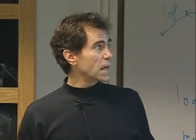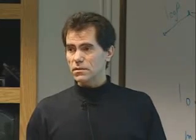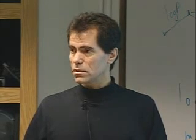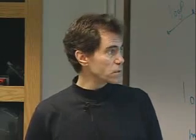But the key to that is good weight allocation and good iteration with each of the elements that you've allocated the weight to, to keep up with them, to make sure, yeah, they can meet that, or looks like they're going to exceed, so I've got to go borrow some of that allocation from somebody else. And I've got to take away from Peter, if you will, to pay Paul. So systems engineering, in going through that, making the initial allocations and keeping up with that is a critical factor to making sure you get to the final answer. And if you do that well, then usually you have less of a problem getting to the final solution.